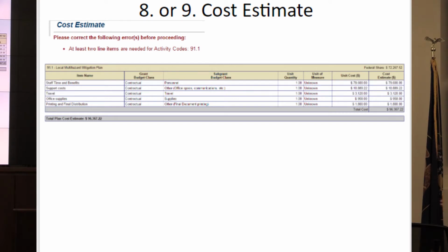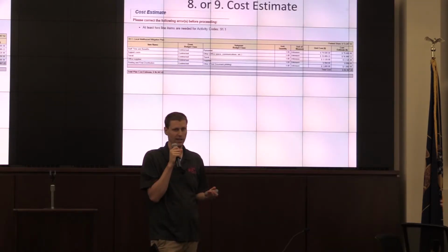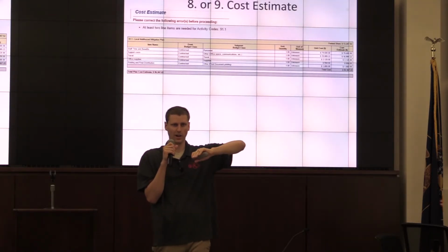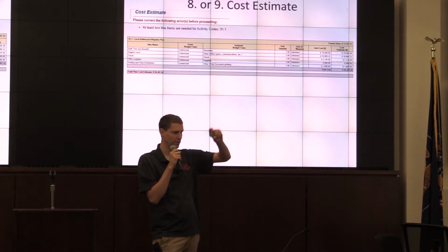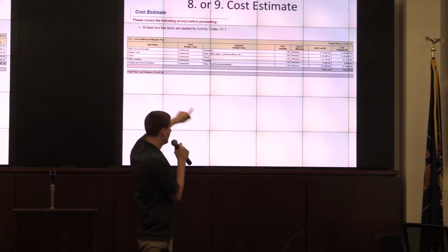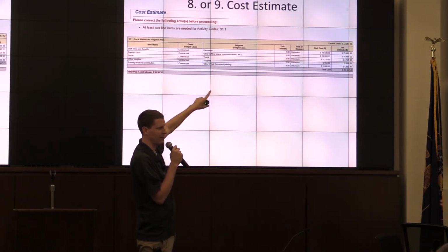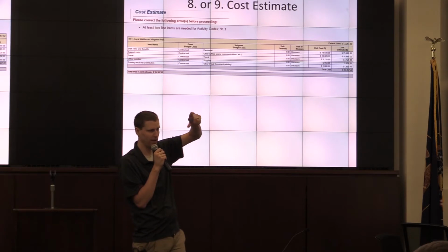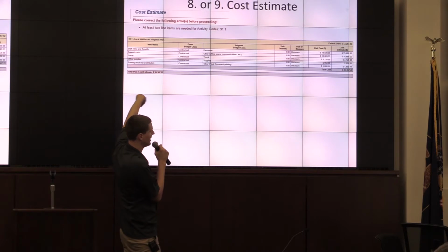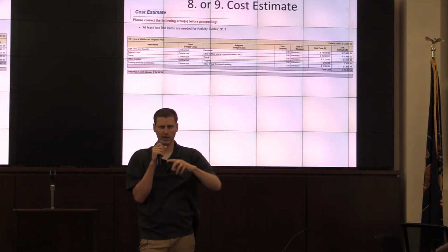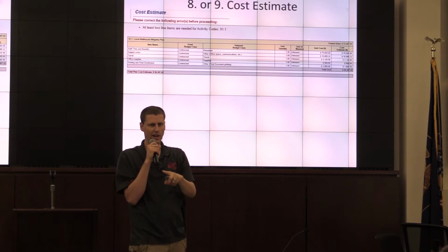Like I say, you'll have this in eGrants, but one of the requirements is you have a budget narrative. And there's no option to put a budget narrative in eGrants except as an attachment. So that Word document we talked about, where you're going to include your scope of work, your schedule, your budget, and budget narrative, you'll take this budget, and it's got to look exactly like whatever's in eGrants or your Word document. And then for your budget narrative, for every one of these line items, you'll put that in and have a description of what that entails and then how you came up with that cost.